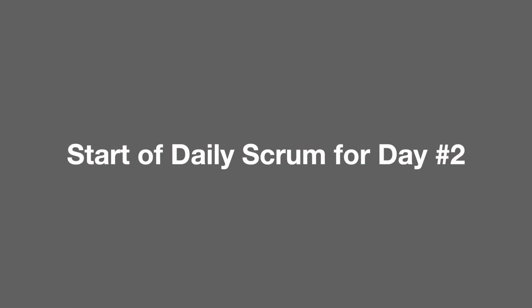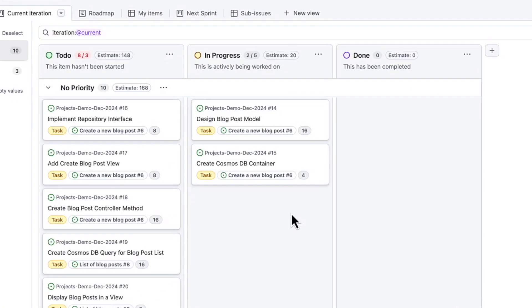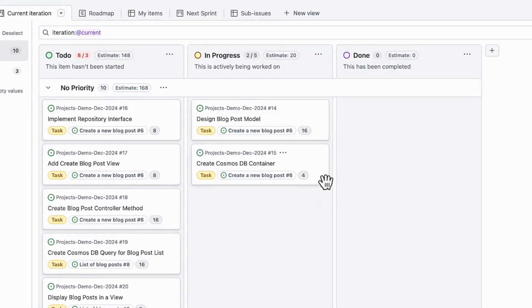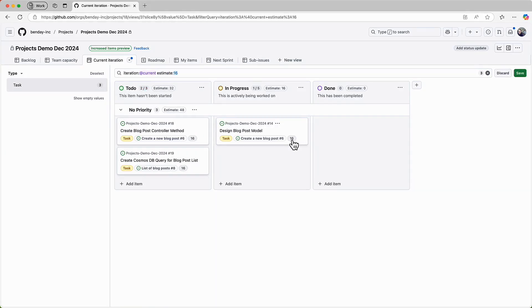Fast forward to the next day in the sprint, the team is back in their next daily scrum meeting. So let's say the team is in their meeting and they start discussing what's done and what's left on these two items, design blog post model and create Cosmos DB container. At the start of the day yesterday, we thought there was 16 hours left on design blog post model. Now we think there's eight hours left. So we want to update this remaining work value to reflect our current understanding. So we click on the 16 to edit it. And well, that didn't work.